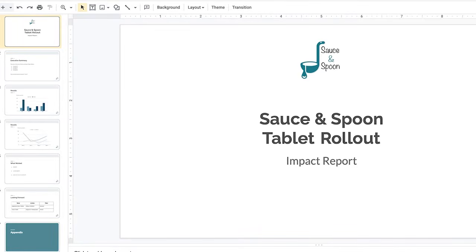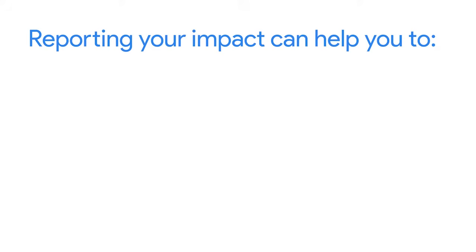The purpose of creating an impact report is to show others the value that's been added to your project. Usually, it's in the form of a presentation guided by a deck or slideshow you've created. Unlike a detailed closeout report that's designed for future project managers or other readers interested in the project details, an impact report is typically created for senior stakeholders or project sponsors who weren't involved in the day-to-day details of the project. Reporting your project impact is key for a few reasons.